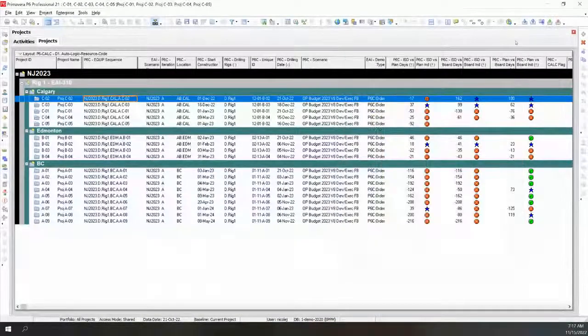Now, that's one example, and this example is at the project level. We can do the same thing in the WBS or in the activity codes. So this is food for thought. If you've ever worked on a turnaround where you might have thousands of valves being worked on, you don't want the first valve you're working on to be at the top of the list and the second valve you're working on to be way at the bottom, just because the equipment numbers are usually what you're using to sort. So this would make that so much easier for you. It takes away some frustration.